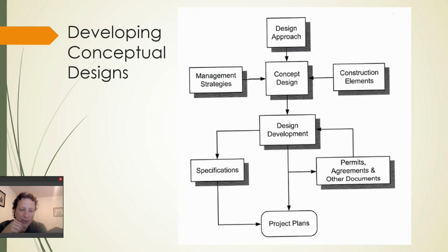Your conceptual design is crucial because it's going to initiate the project implementation and produce ultimately construction specs that your contractor can work with. And it's also going to inform your grant applications, your permit applications, everything that you communicate to the world about the project comes back to your conceptual design that you and your stakeholders develop. So this is a really important step.